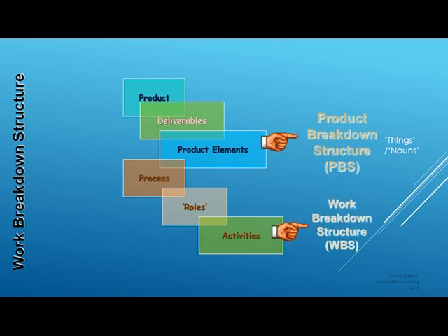Development of the PBS through design processes, allocation of people who will undertake the roles within the process and the activities they will undertake completes the work breakdown structure. When we write down words to describe process and activities, we use verbs or actions that describe the work that must be done. This is a helpful idea that helps to focus on the concept of doing something.